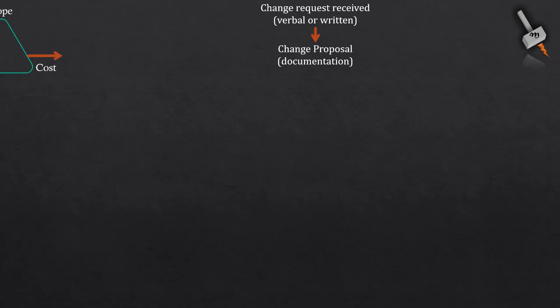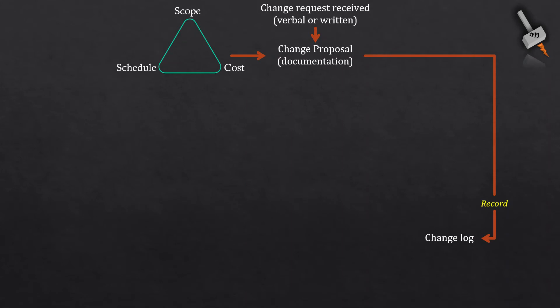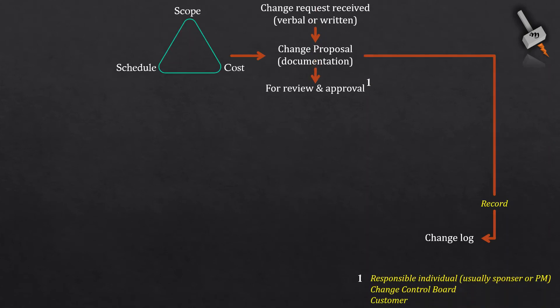Following to that, the project manager evaluates the impact of the change on the basis of three factors of the iron triangle. For making this evaluation, the project manager might ask the project team for the information. The change request along with details like impact on cost, scope, and schedule is shared with the review committee, which has the change control board, project manager, project sponsor, and customer as the members.